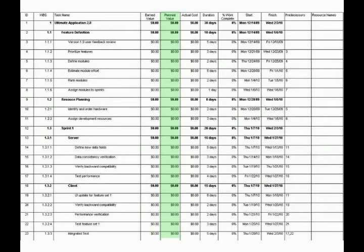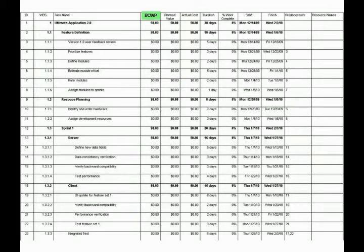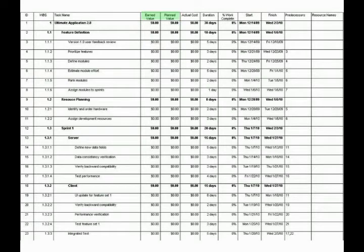Planned value is determined at the task level from your work breakdown structure. If you're using Microsoft Project, earned value is called the BCWP, or Budgeted Cost of Work Performed. Planned value is called the BCWS, or Budgeted Cost of Work Scheduled. These are legacy terms and have been replaced by the terms earned value and planned value. You can change the column header by double-clicking on the header and entering these names in the title box.